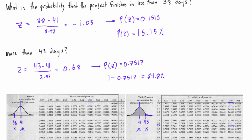It's important to note that if we wanted to know what the probability of being less than 43 days, well then it would be that 75.17% chance. Hopefully that's not confusing, I will see you in the next video.